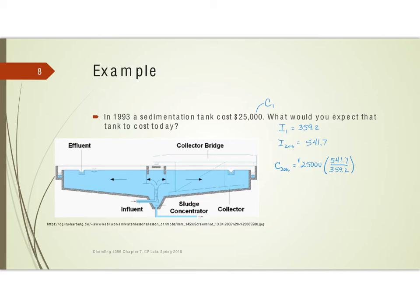If you multiply these out, we get a specific number. All we do is take the $25,000 and multiply by the new index over the old index — 541.7 divided by 359.2. Because it's a cost estimate, my rule of thumb is to keep one extra digit on preliminary numbers before getting to the final project total. So $37,700 is a good estimate for the sedimentation tank today. In our next lesson, we're going to look at a project where the data has changed in both size and time. Thank you very much for your time.